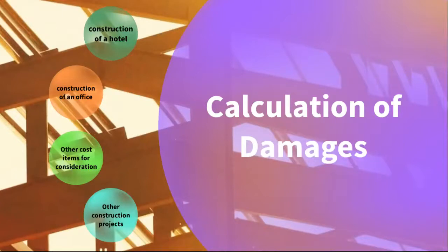unenforceable. Therefore, it is recommended that calculations for liquidated damages must be thoroughly considered, and a detailed record of the final value must be retained in case the amounts are challenged at a later date. Damages can be calculated in a number of ways depending on the nature of the project.